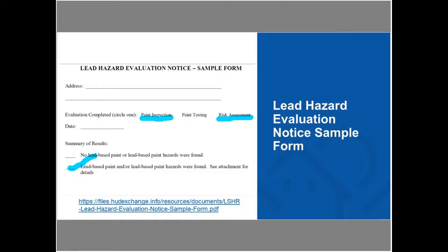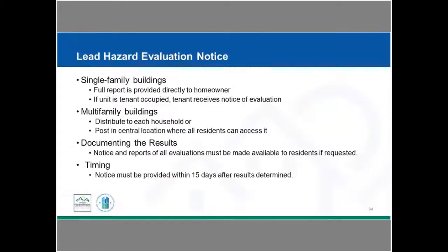Generally, with that report, there would be a requirement that the owner sign for it. In some cases, with a multifamily structure, we might be posting that report, and we would have documentation of when it was posted, and I would think a photograph of that, so that you have documentation that you met this notification requirement. If you're starting out putting together a program plan, you may want to think about having a standard process in place, with a tear-off signature receipt as part of that.